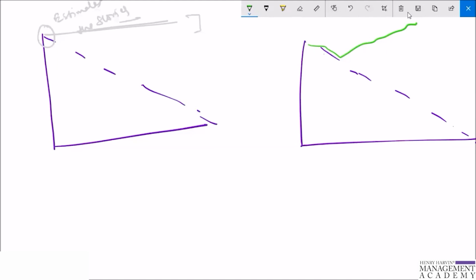When this graph started becoming visible for my team, when I was working as a Scrum Master for them, what I did is I started a daily sprint with them for a few days because the team was not able to adhere to the sprint guidelines. They had to plan daily and burn daily. So when for one sprint they tasked daily for 10 days and burned daily, they got some progress.